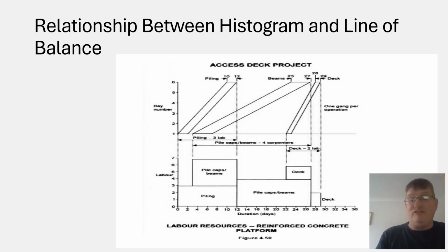There's an argument I can reduce that considerably, because I would put that pile cap and beam line into balance. So at the moment, it's like this, and I can just take it up so it's like that. And what I'll do is move that across from 29 days, hopefully down to around 18 to 20 days. So I'm reducing the operation by about 10 days, maybe at max. I hope that makes sort of sense. I'm not there to take questions, so I do apologize.